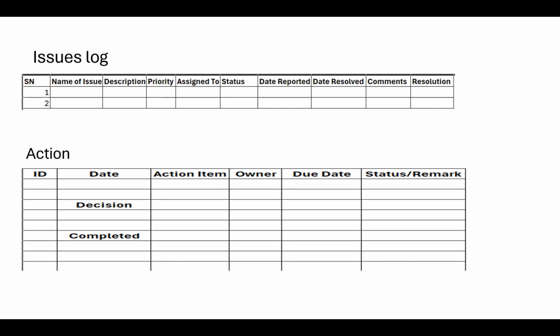Because without them being able to sign in, they can't even use the app at all. That is a gateway. So every other thing will not work if they don't enter. So that is a high priority. So we now begin to assign resources, allocate manpower, and say, look, this is of a high priority.